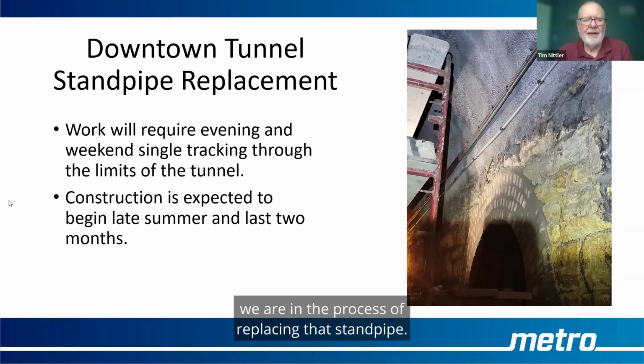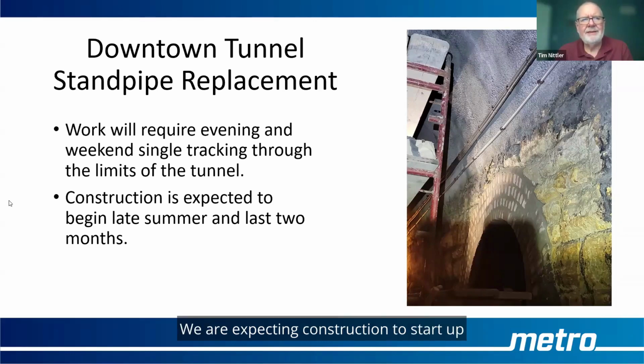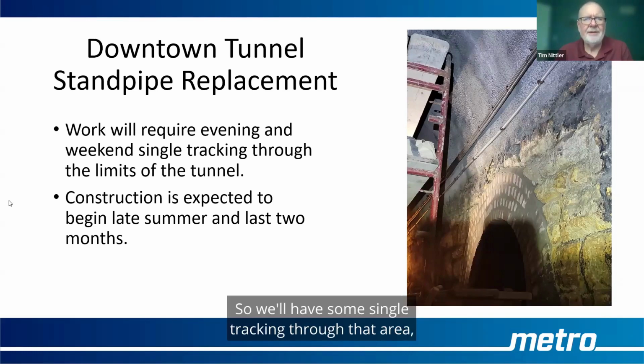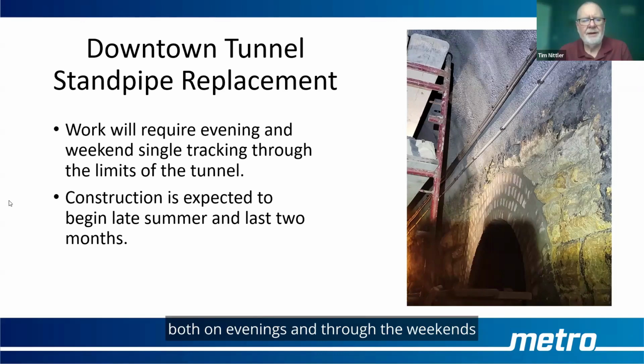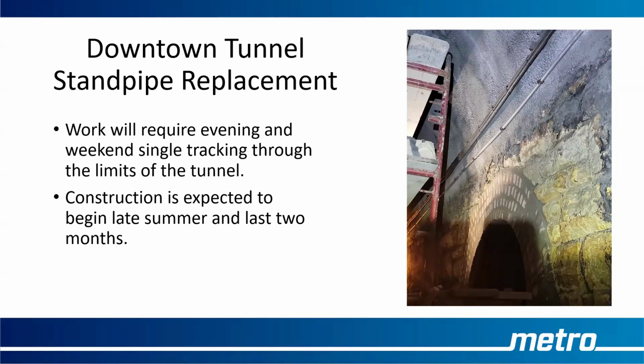So that is a very important safety feature of any tunnel, and as I stated, we are in the process of replacing that standpipe. We are expecting construction to start up within the next few weeks and then last another 2 months. So we'll have some single tracking through that area, both on evenings and through the weekends, to try and get that project wrapped up sometime this fall. And next slide.